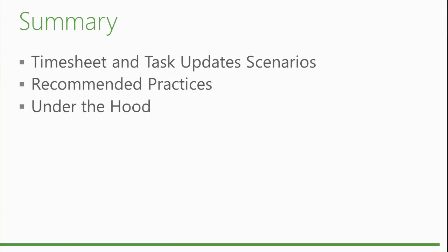For looking at timesheet status across a period, it appears that if someone has not created their timesheet, there's nothing there to get the status. You have to look by the absence of it. Yes, you will have to do another join to be able to show that, but you can do that. It's true. This table will only show what has been created for the timesheet compliance. Otherwise, it won't show up if it's not created.